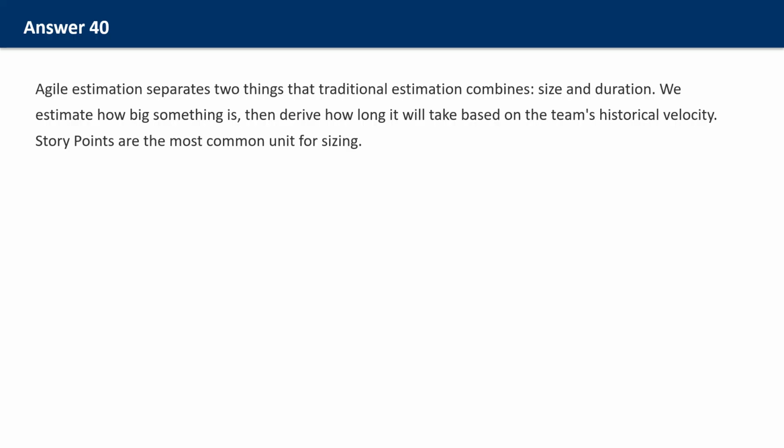If a senior developer says 5 before others have thought it through, less experienced members often defer rather than disagree. Private selection followed by simultaneous reveal surfaces genuine differences. When estimates differ significantly, the highest and lowest estimators explain their reasoning. Often, the low estimator is missing something the high estimator saw, or vice versa. The discussion that follows is actually more valuable than the number itself.